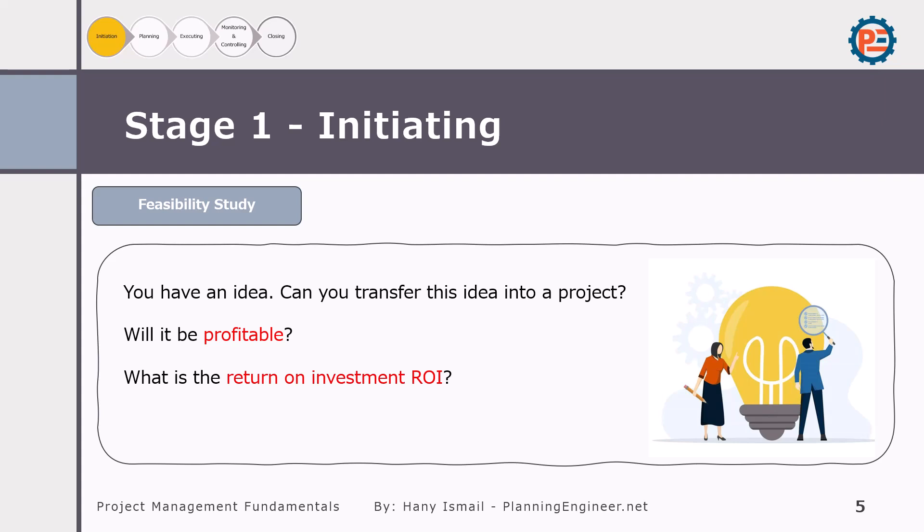Some may ask about governmental projects which are not constructed for profit — for example, building a governmental hospital. Although you are not going to collect money from patients, you still need to calculate the project as if it were a commercial hospital — how much a patient should pay — and determine the cost and after how many years it will pay for itself. This is how you calculate the return on investment regardless of who collects the money.